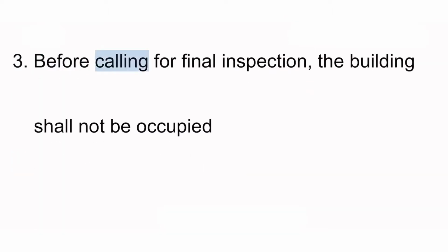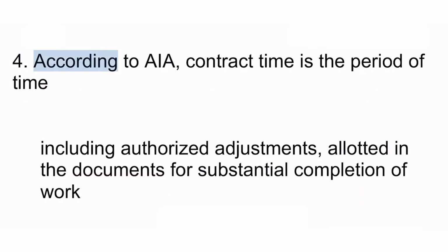3. Before calling for final inspection, the building shall not be occupied. 4. According to AIA, contract time is the period of time, including authorized adjustments, allotted in the documents for substantial completion of work.